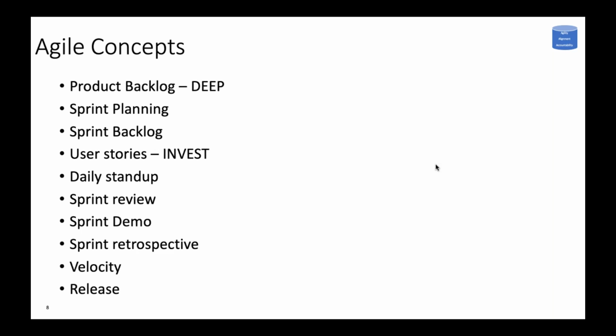So what they do is ask, what is this feature? How do I decompose it? I'm using the word decompose because many of you might have come from the waterfall world. That's what we do in the WBS. We decompose that feature into more manageable tasks called user stories, and then we start estimating them, so that we can say, okay, Mr. Product Owner, you gave us 4 features, but based on our capacity and the complexity of the features, we can only work on 2 in these 2 weeks, or we can only work on 3 in these 2 weeks. It is a continuous, open communication between the product owner and the team.